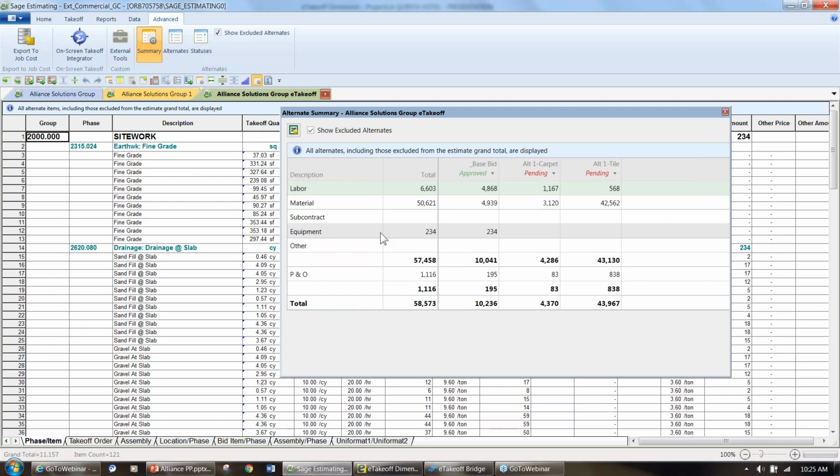In commercial, residential, you get those in the spec book. We get the alternates. Hey, price this out versus this. Maybe we'll add this and subtract this. You know, those types of things. So we get a list of those alternates out of the gate on some of the projects that we're working with. Well, during our digital takeoff, why not have that available for us so that we can just do that in one step rather than coming into the estimate? So those are the key things that I wanted to kind of highlight.